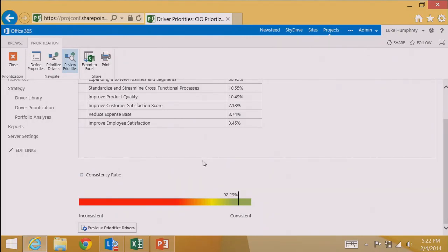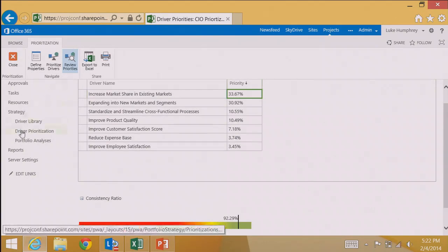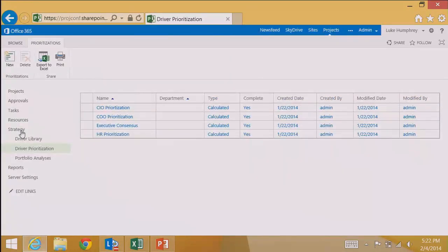So Luke, you mentioned that you actually follow this process within Microsoft IT. So how would you do this in real life? I know we can do this in the tool. Yeah, so we actually do this for the project releases that we build. IT has done this, and Microsoft HR has done this, and other organizations. Once each individual in the leadership team has gone through the exercise individually and figured out what relative priority values are meaningful to them, then you want a consensus to be formed among each member of the leadership team.